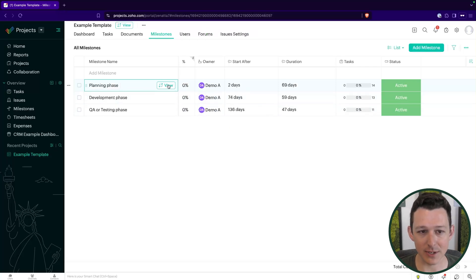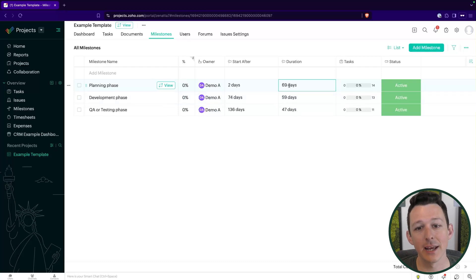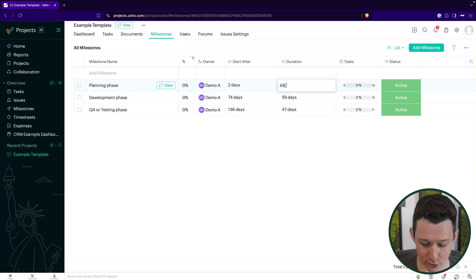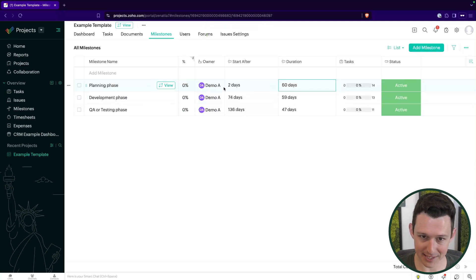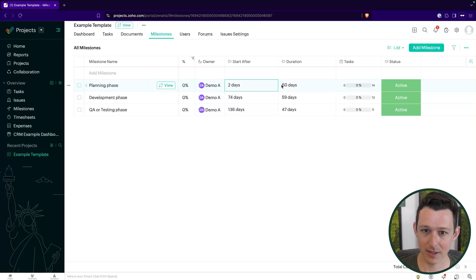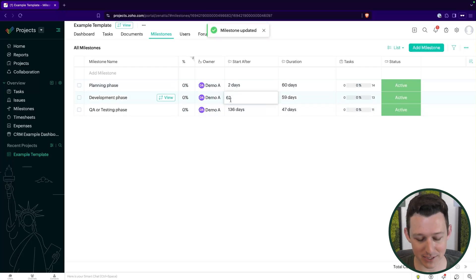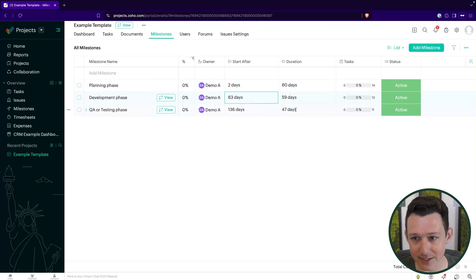The important thing about each milestone is that they have a start after and a duration. When we launch this as a project, the start after refers to how many days after the project launch this work begins, and the duration is how long it takes to complete. So if I wanted a milestone to start two days after launch and take 60 days, the next milestone can start after 62 or 63 days. You'll be adjusting the start after and durations so they dovetail together properly.